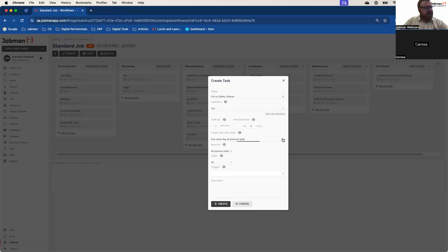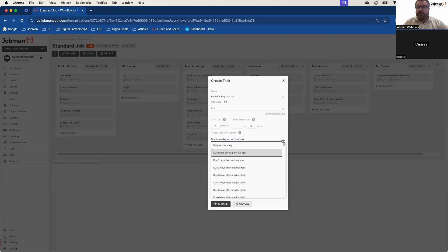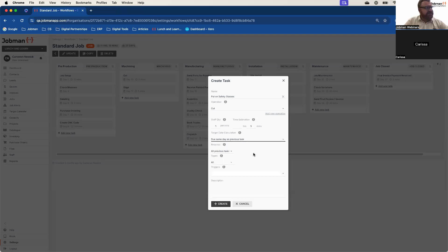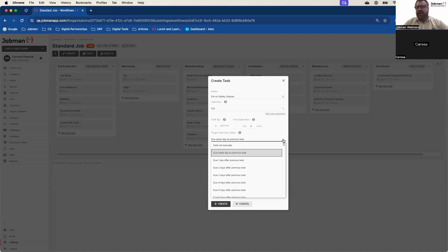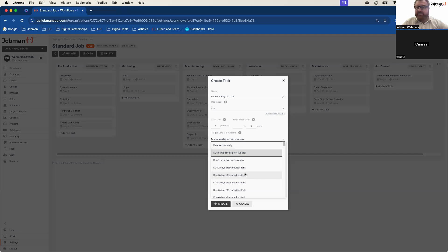The point to target date calculations is: how quickly do we want to move through this process? In this example, as soon as I can start cutting CNC, I need to put my glasses on, so I want this process to happen the same day as the previous task. If the operation you're about to handle has a time requirement — a lag between two operations — you can set that up. For example, if the previous operation was 'create CNC code' and within your business there's usually a three-day lag before you kick off cutting and assembly, because that allows time for purchase orders to arrive, you can say: make this task due three days after the previous task. JobMan will automatically wait three days before putting in the next task.